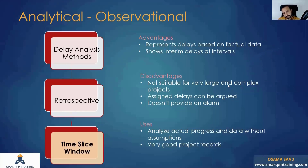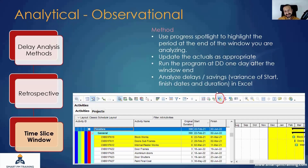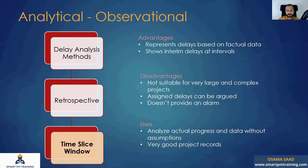Advantages: it represents delays based on factual data — no assumptions, no hypothetical fragments like 90 days of material delivery that may actually take less. It also shows intervening delays at intervals using the window approach. However, it is not suitable for very large and complex projects. Just for one window with a few activities it takes significant effort. Imagine 10,000 activities across 24 windows for a 24-month project — the volume of work involved is enormous.